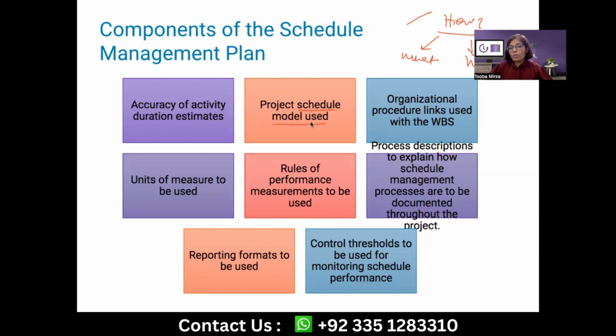Which unit of schedule are you going to use? Now, maybe someone would assume in their head that the unit is always going to be days. Maybe in your case, it's always days. Maybe in someone else's case, it's going to be quarters, because they are planning a huge, very long-term project, maybe a 5-year or 10-year project. In that case, probably scheduling on the basis of days is very hectic. So they may want to have weeks or maybe months, whatever applies. So what is going to be the unit?